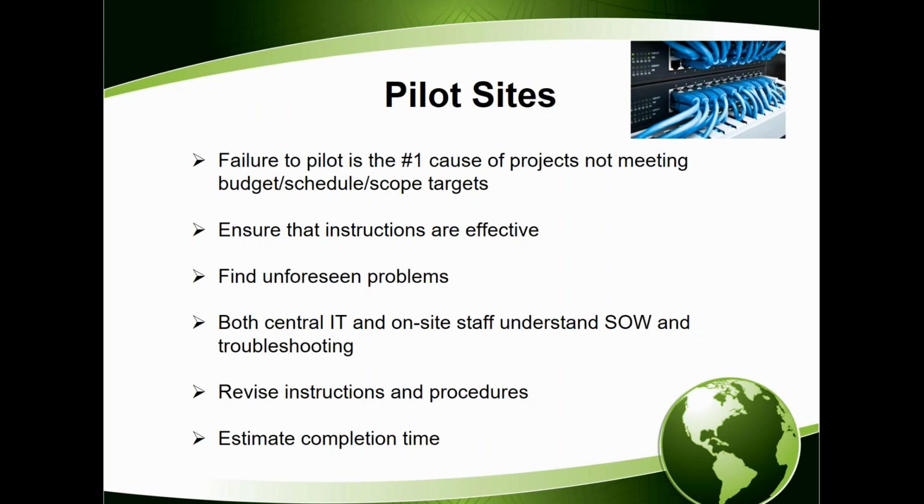Last year, we were doing a Wi-Fi access point swap out for a large company that you all know of, but I won't mention them, to protect the guilty in this case. They had scheduled a swap out, and they were estimating that it was going to take about 15 minutes per location. The thinking was, you just unplug the existing Wi-Fi point, put the other one in its place, plug it in, screw it back in, and call our help desk, they make sure they've got a green light, that it's on the network, and there they go. At most, it'll take half an hour if there's some kind of connectivity that we need to troubleshoot.